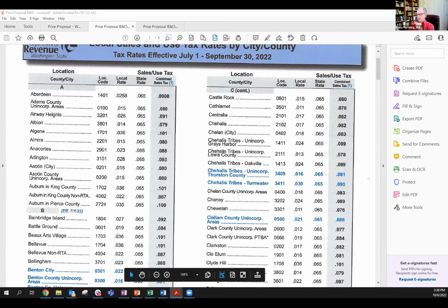So if they didn't include it in their proposal, where's that money coming from to pay for all the people in the corporate office, in the headquarters? The only place it can come from is profit. So now you reduce your profit from 5% to 4% because of B&O taxes, and now you're further reducing it because you didn't include indirect costs, and now it's going from 4% to 2%.